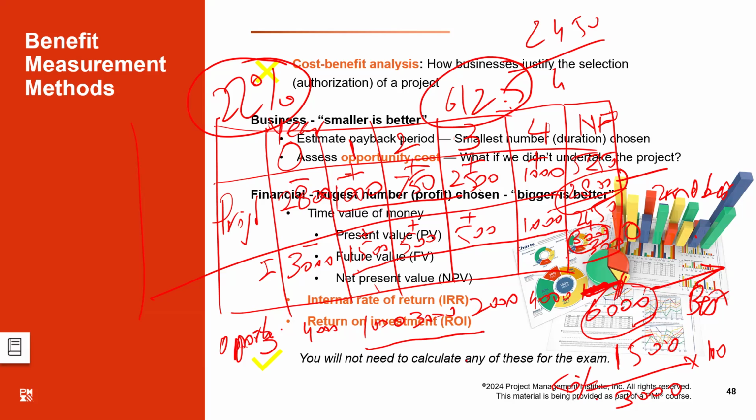So just like I calculated forward, with present money moving towards the future, now when I calculate backwards from future money to present value, I will have to apply another kind of rate, which is just like the interest rate, but when we travel backwards in time, we call it the discount rate. So we will apply the discount rate, and that will give me the compounded effect, and that will tell me what it is worth today, right?